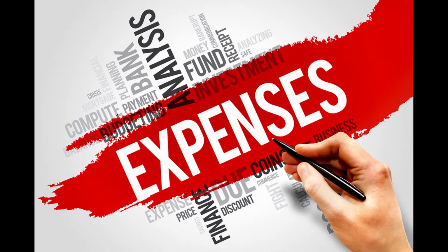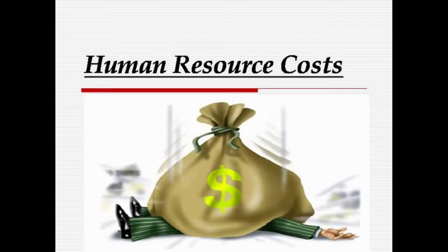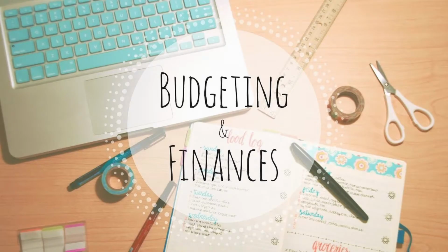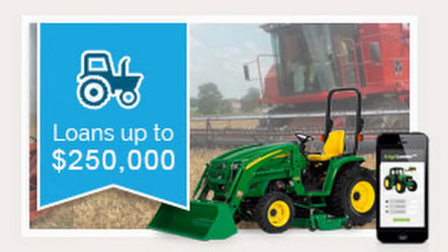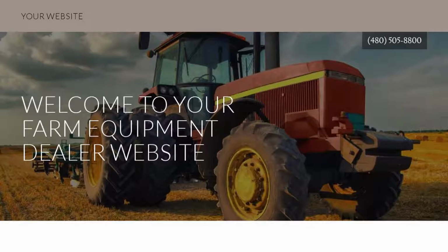If you haven't already researched product and enterprise expenses for each of the individual strategies you've developed, marketing, operations, human resources, finance, do so now. Secure certified bids for all equipment and machinery from manufacturers, dealers, or representatives. Certified bids come directly from the equipment representative and are often required by lenders when applying for a loan. When certified bids are unavailable, look for published cost estimates or talk with other producers who purchased similar inputs or who have initiated a similar business strategy.